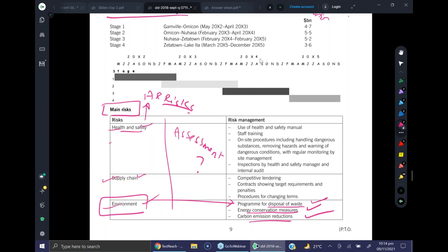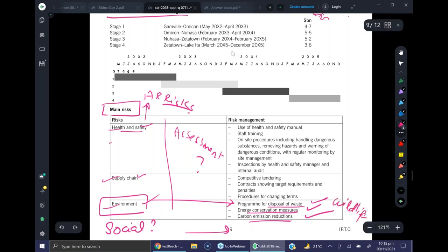So there might be some more specific risk assessment and risk management measures mentioned? And also, do you think a social risk needs to be added here? The effect on communities when we build the road, how they will be impacted, and the environmental risk should be talking about the impact on the environment, the wildlife. Yeah, that is also not mentioned. So we are giving the feedback like a senior and just highlighting and recommending what needs to be added.